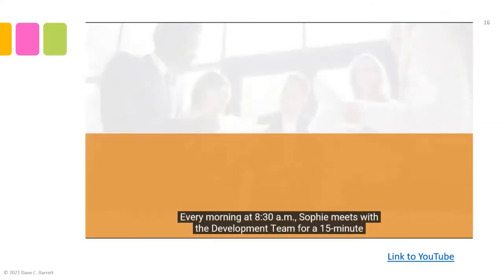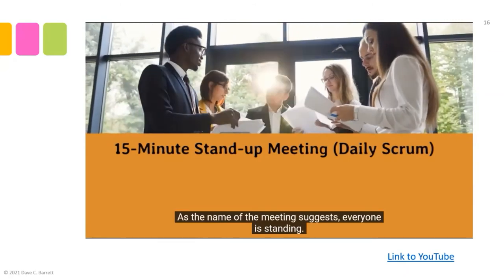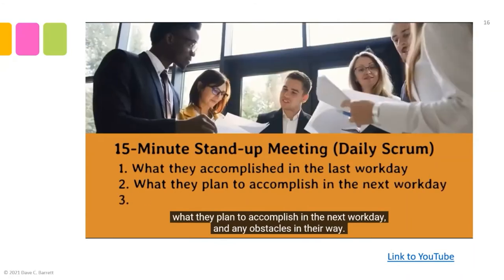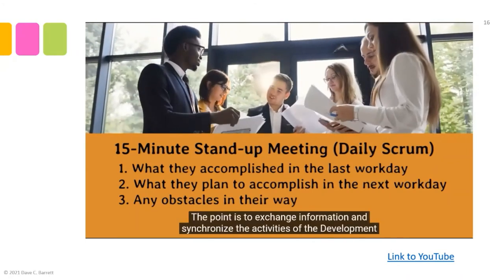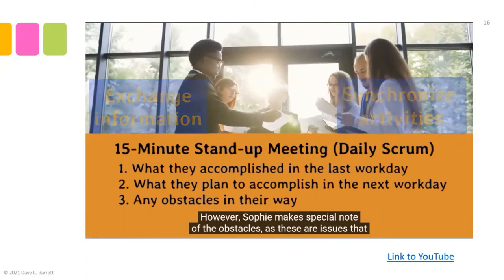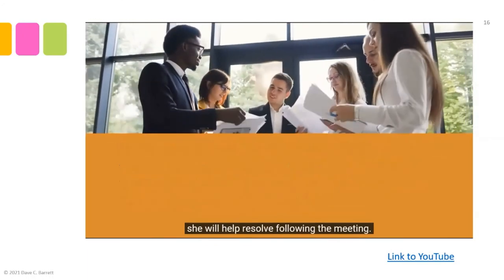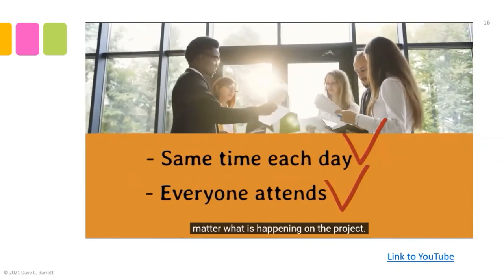Every morning at 8:30 a.m., Sophie meets with the development team for a 15-minute stand-up meeting — as the name suggests, everyone is standing. One by one, each developer indicates what they accomplished in the last work day, what they plan to accomplish in the next work day, and any obstacles in their way. Minimal questions are asked; the point is to exchange information and synchronize the activities of the development team. Sophie makes special note of the obstacles, as these are issues she will help resolve. The meeting takes place every day at the same time with everyone attending — the daily scrum is a vital aspect of the sprint.